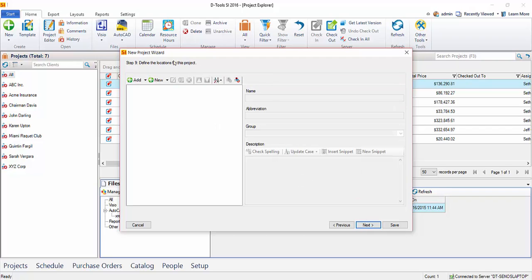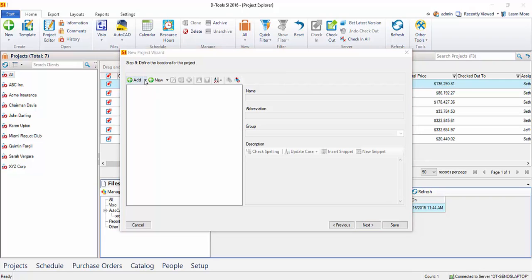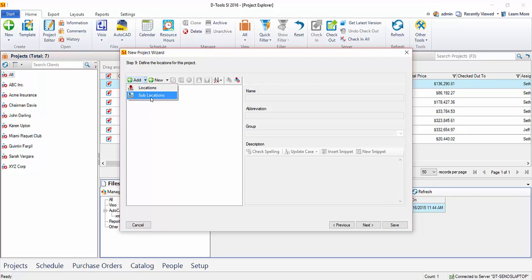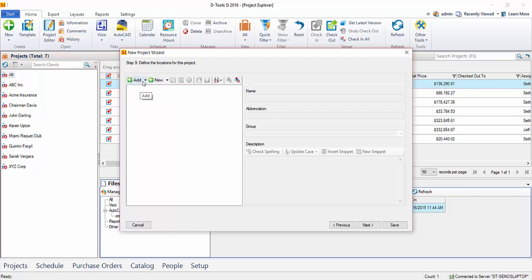Clicking Next, this is where we're going to define the locations for the project. And this is an important step. This is how you're going to stay organized as you're adding products to the project. You're going to choose a location and or system to assign those products to. The next step will be systems. There are two buttons here, Add and New. They both have the same dropdown, Locations or Sublocations. New will be if you're going to manually type in the name of the location or sublocation. The Add will pull from your preset list.